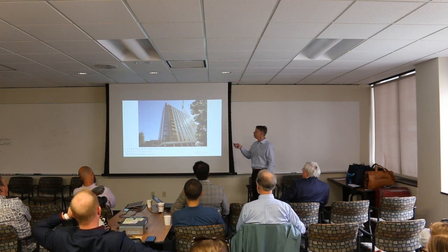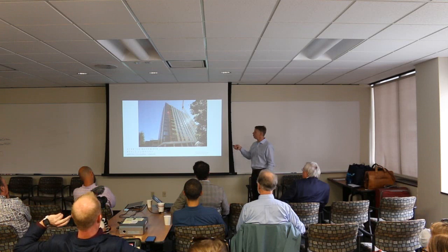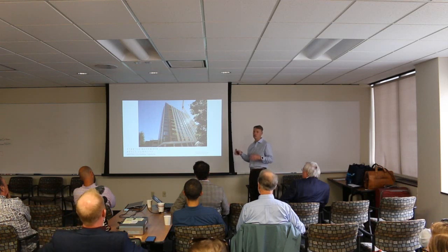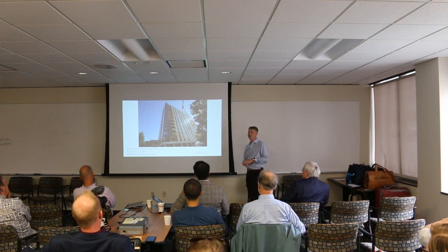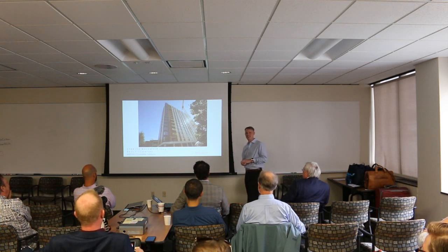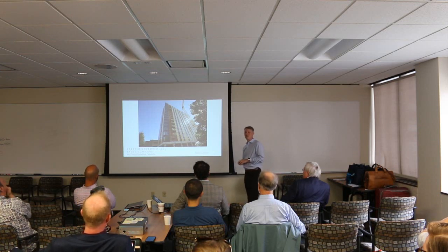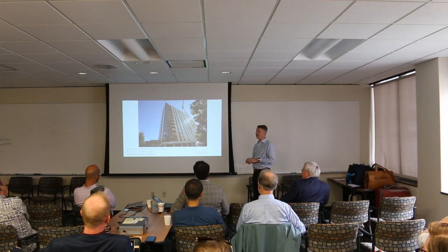That's a cladding system, CLT floor plates, glulam posts at the corners of the CLT floor plates. Anybody have an idea? 68 days. Yep, exactly. 68 days, 9.5 weeks dried in. They were like the third or fourth story on their concrete job across campus. And that's when the GC went, oh, hey, this is the best thing ever.